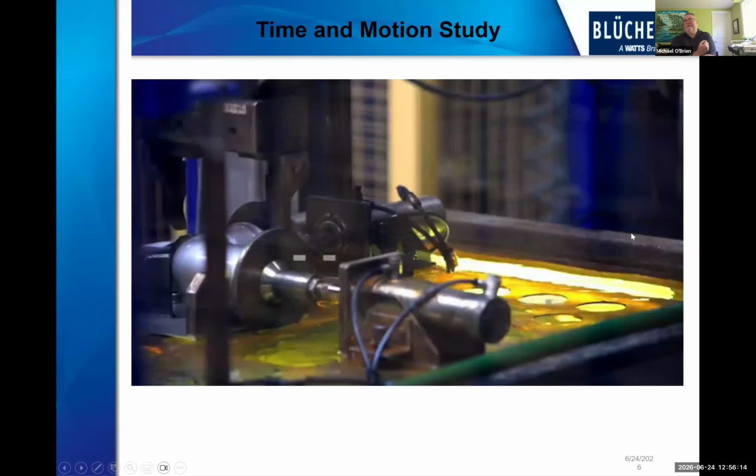We used the same hangers for all three products, but both PVC and cast iron actually require two or three times more hangers than BLÜCHER does.